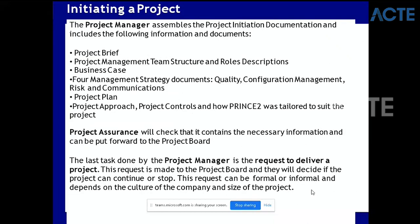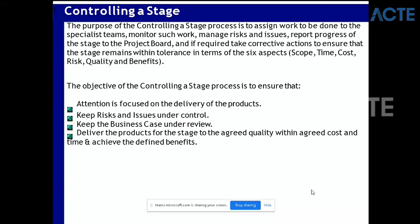Now let's go to the next process, Controlling a Stage. Controlling a Stage is to make sure that whatever you've agreed is delivered. The purpose of the Controlling a Stage process is to assign work to be done to the specialist team, monitor such work, manage risk and issues, report progress of the stage to the project board if required, and take corrective action to ensure that the stage remains within tolerance in terms of the six aspects: scope, time, cost, risk, quality, and benefit.